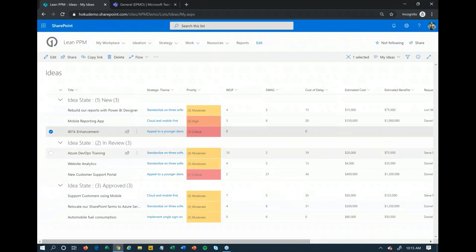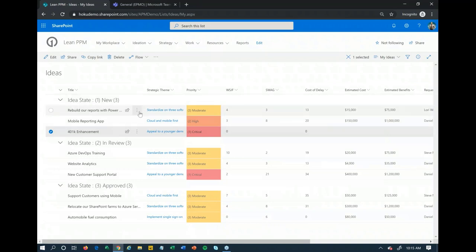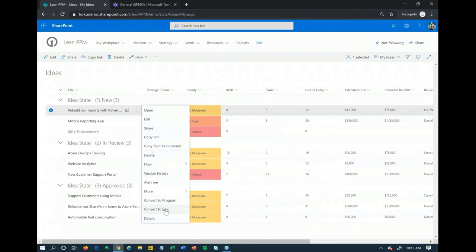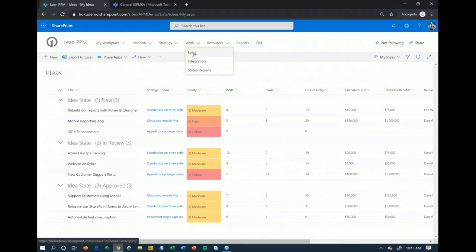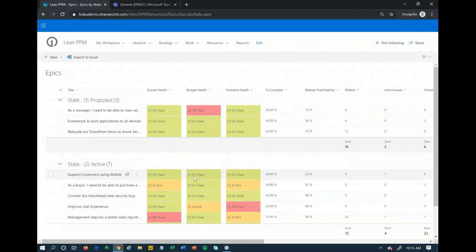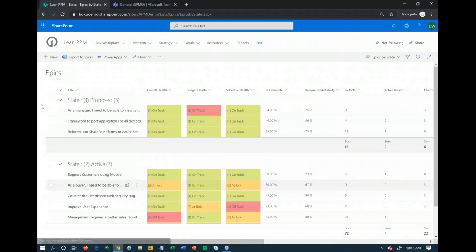The way the process works is as these ideas are going in, people fill out the form, and then you can utilize that information to do some high-level prioritization. When you're ready, you can promote any particular idea into becoming an epic or a program slash project — pushing it to the next state from this big funnel of incoming ideas. I'm going to jump into my epics list. Depending on your terminology in this hybrid world, we can configure that to match — whether you call these initiatives or something else.